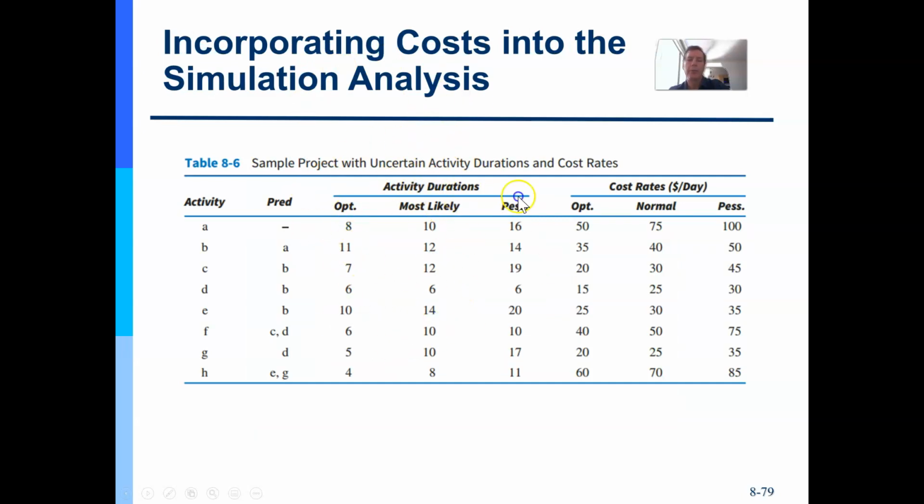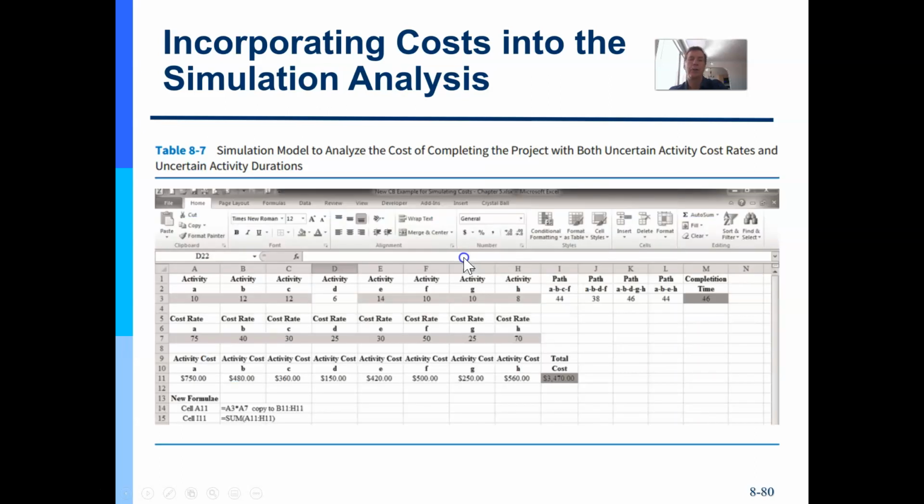You can do the same with cost analysis. You can see we're going to do PERT again based on cost. So PERT can be applied to cost or schedule. It's a good tool to reduce risk to your project to get a better estimate. And of course you weight the most likely by a factor of 4. So it's optimistic plus 4 times the most likely plus pessimistic, divided by 6. That's your PERT estimate, whether it's cost or schedule. Cost, of course, is going to be in dollars, schedule in time, but you can convert schedule to dollars also, right? Time is money, is it not?